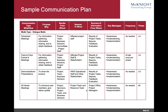I recommend a communication plan. You're going to have scheduled meetings, face-to-face demonstrations, presentations, all-hands meetings — these are all at your disposal. And you can take this slide and do it right because it's kind of all filled out as an example. It's targeting all the people you need to target: the project team, business advisors, committees, project staff, et cetera. You can see the frequency, face-to-face meetings, events, and so on. Pull this off and put it on your backlog.